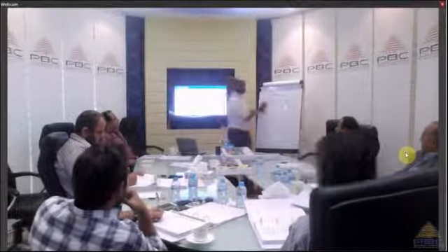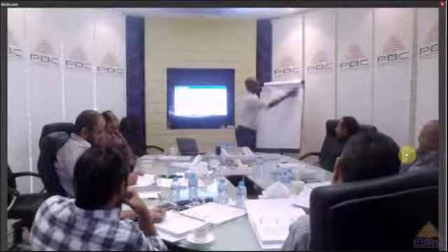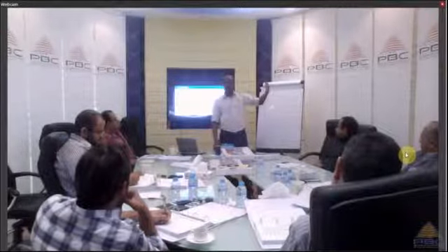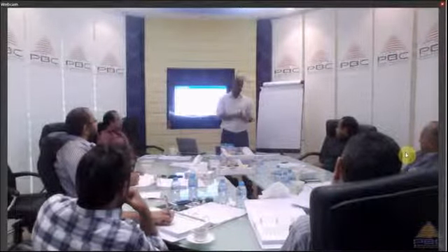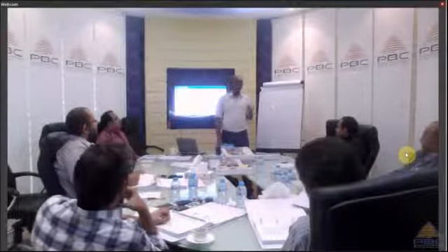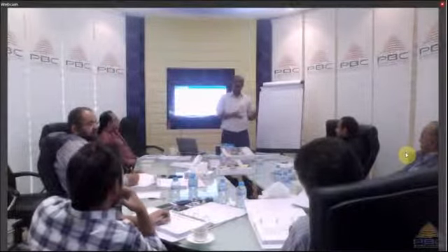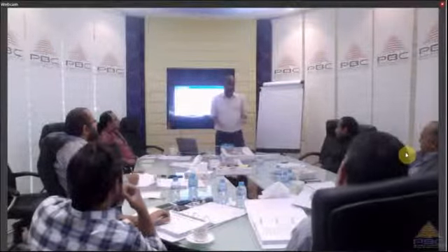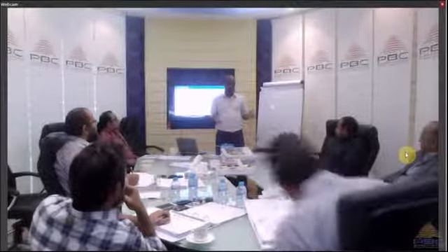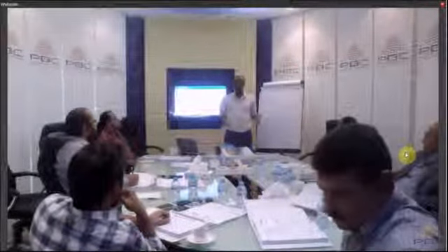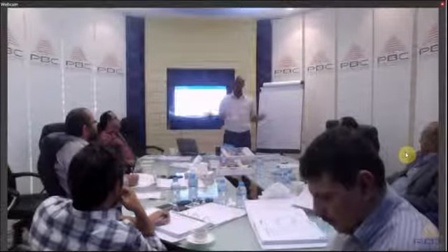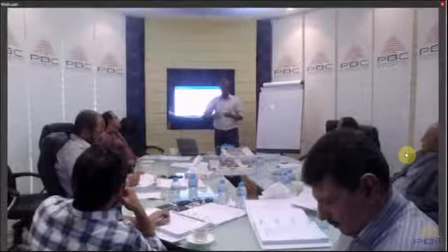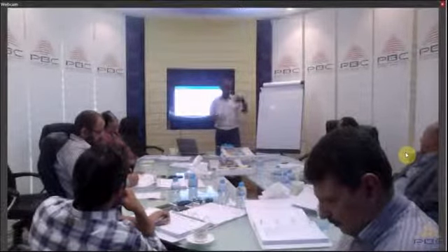Okay? So if suddenly the client for Ta'ziz Tower received a bill for 100,000 riyals for breaking some rocks in the foundation. He encountered some rocks. Okay? So he says, what? You tell him, oh yeah. Why? Because one of the constraints is we have to build it in this location. You did not give us the option to choose the best location. Right? So the constraints will justify certain actions that you do because it's there, it's listed.